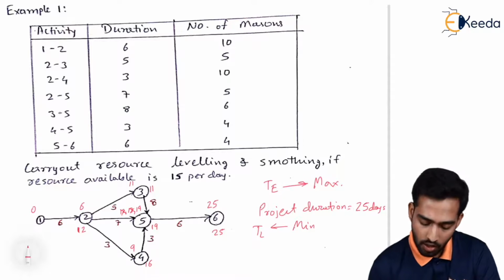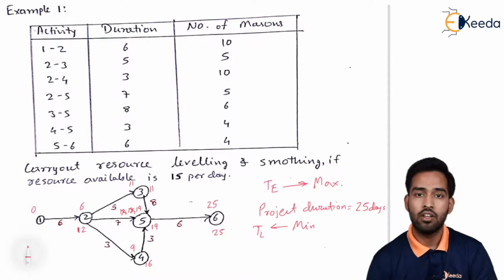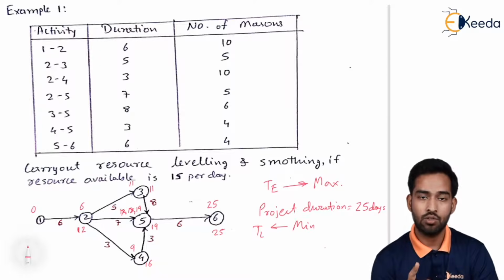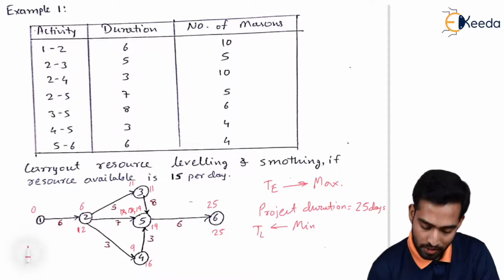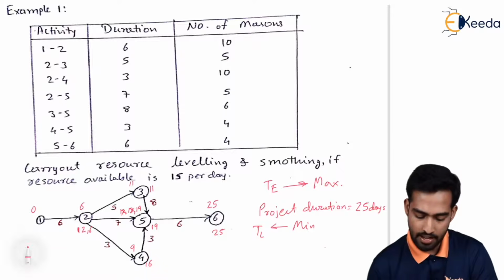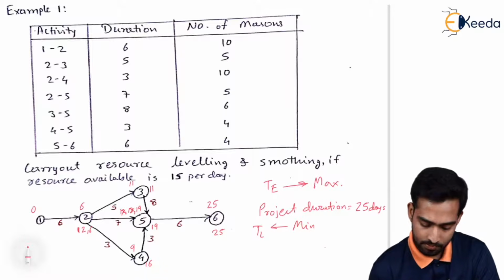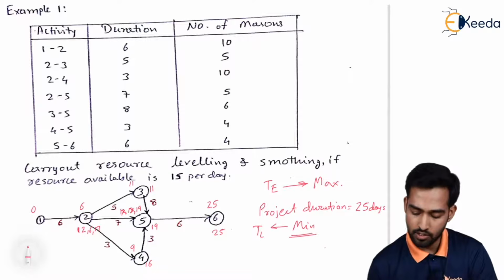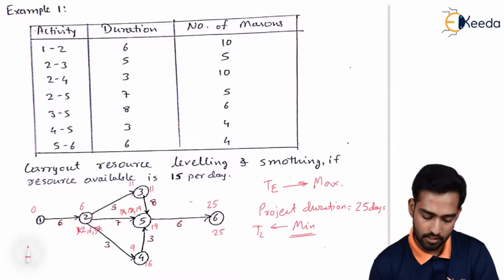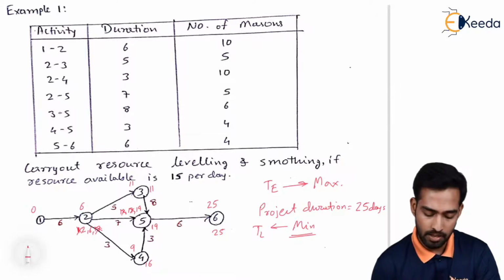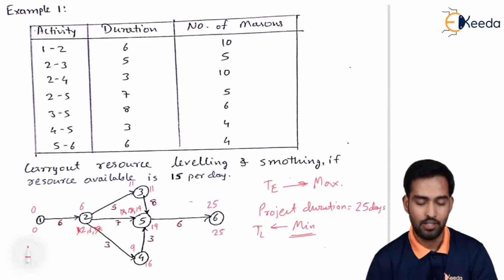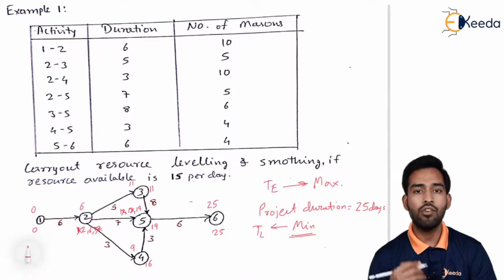Now as you can see, on your second node we are having 3 arrows, so there should be 3 values. So 11 minus 5 will give us 6 and 16 minus 3 again will give us 13. As the rule says, we have to keep the minimum value, that is 6, and now 6 minus 6 will give us 0.